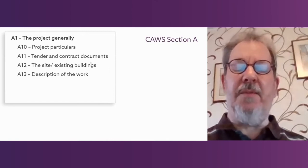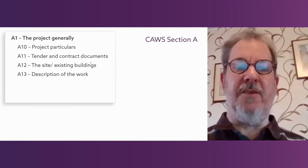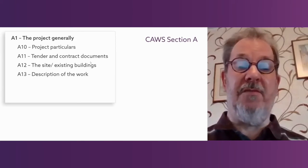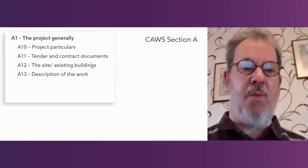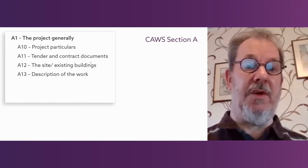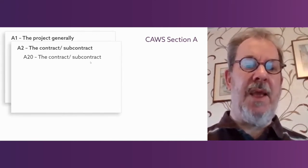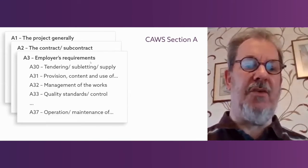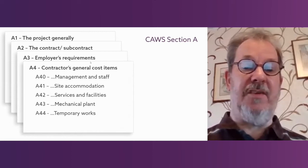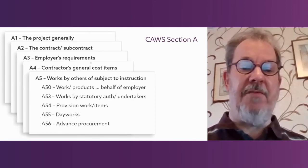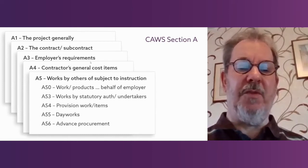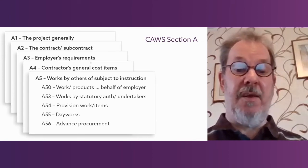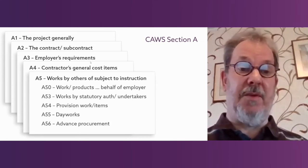Just taking a bit more of a look at common arrangement. Common arrangement, when it comes to preliminaries, is divided into five main sections. There's section A1, which covers descriptions of the work and the documents. Section A2, which is the contract. A3, which is called Employers Requirements. A4, Contractors General Cost Items. And A5, which is a home for some of the more eclectic things - work on behalf of the employer or statutory undertakers, provisional sums, day works, advanced procurement.